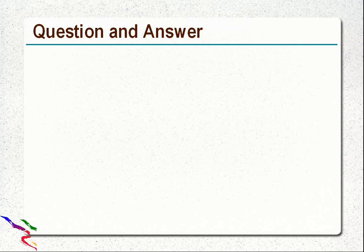Another good question from Himanshu Gyani. When there is a back-to-back plan for developer and tech QA testing, how do we control the slippage in a better controlled way? Because if bug fixing is not finished on the set day, dependent tasks like testing will get delayed. Normally, one QA resource will be working on multiple stories. Another thing is that everyone has more than one work type. So if he is waiting for something, he can take up the second priority work. That's why I call it more controlled, more streamlined, and better utilization of bandwidth.